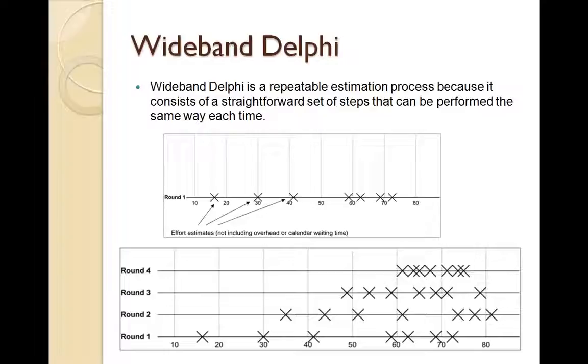In that case, we ask the team members to share their views and their opinion, and then we ask why they think this is taking more time or less time, or what the basis of their estimates was. Once we hear that, the team members might realize, okay, the team member who gave the higher estimate really has a valid point, and I also need to factor that in. And then the team again re-estimates. So then the range will reduce.